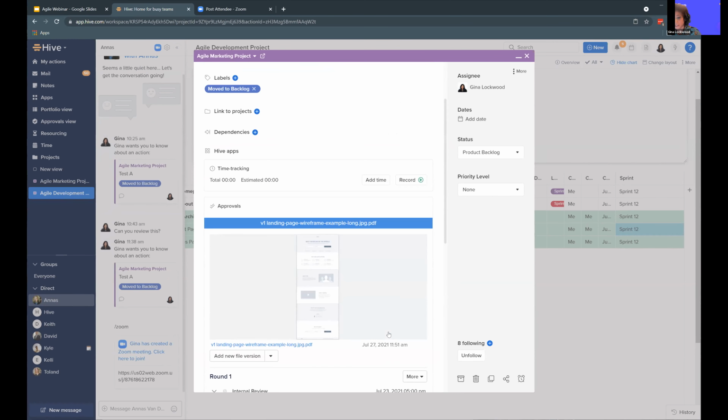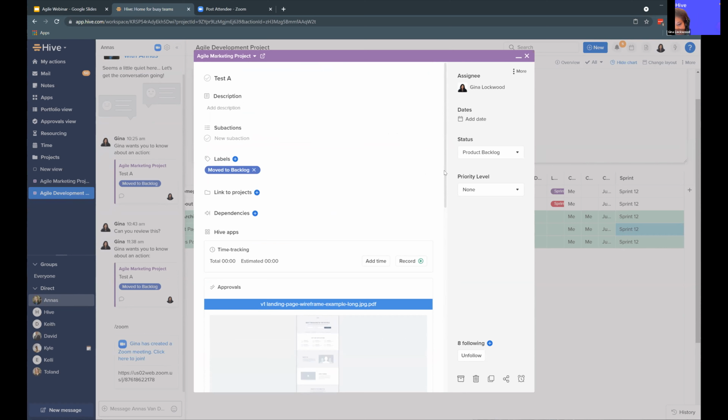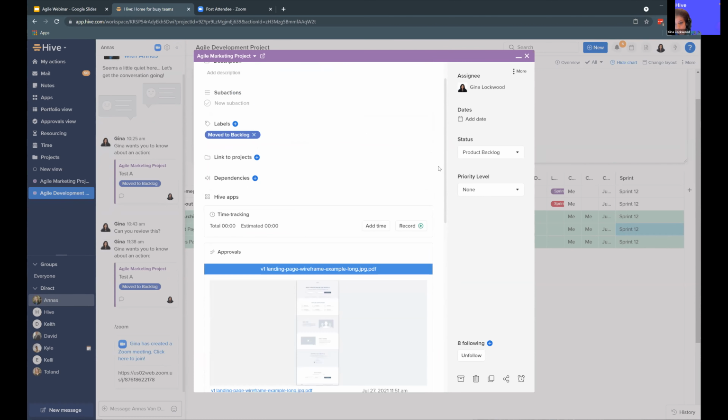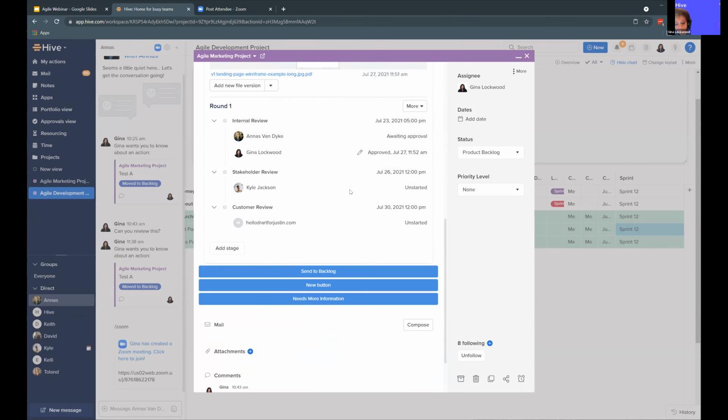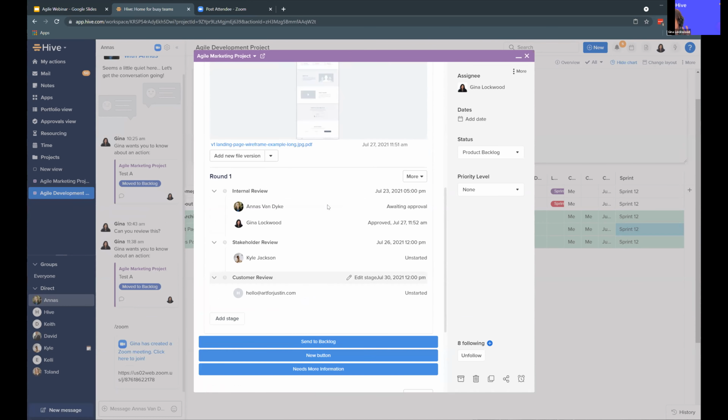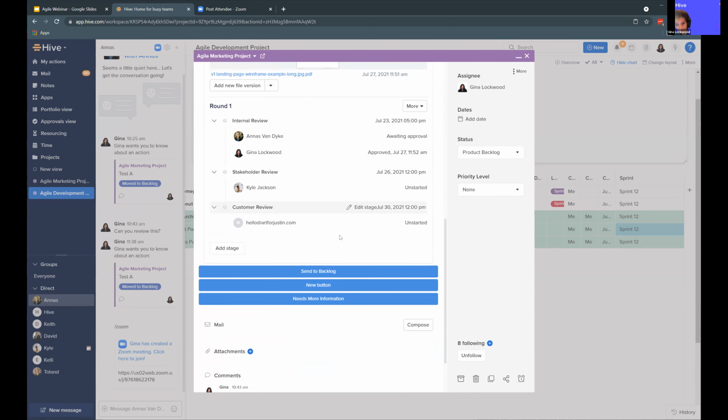And basically what this has done is I've said, hey, when I click this button, update my status and add this label. So by clicking that button, I've gone ahead and I've thrown this into the backlog. I've added a note to easily indicate to myself later that it was originally in a sprint and was moved, and flag that for my end of sprint metrics.